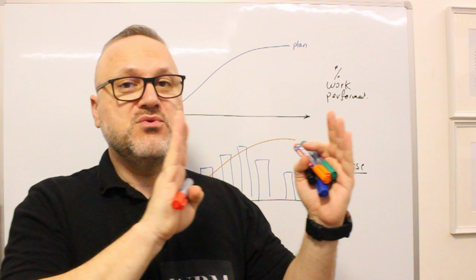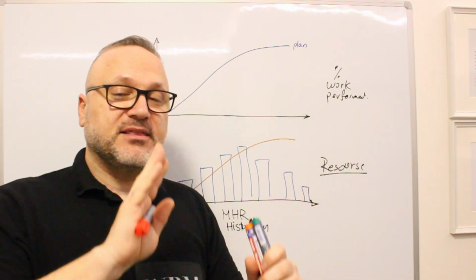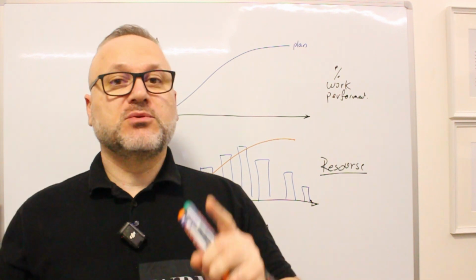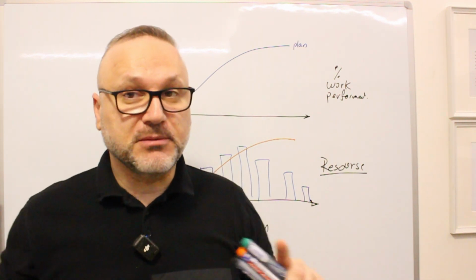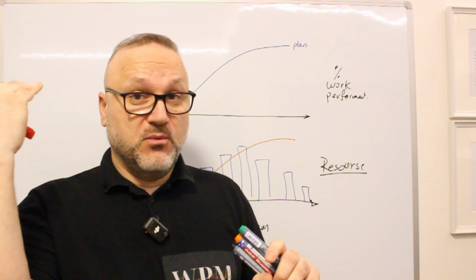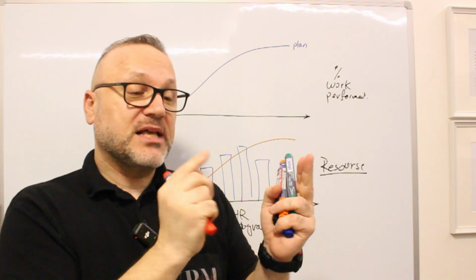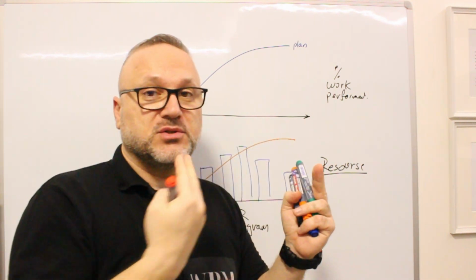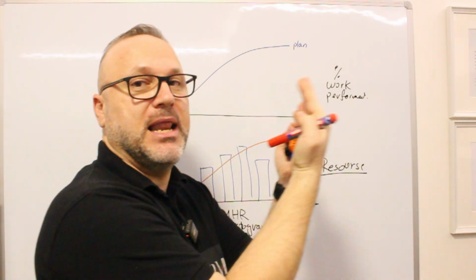They can move forward or backward and they still don't affect the project progress. Tasks that are affecting the project progress are the tasks in the critical path. So we have the critical path, and we have some tasks in between which have some float in front or float behind. They can start earlier or they can start later.